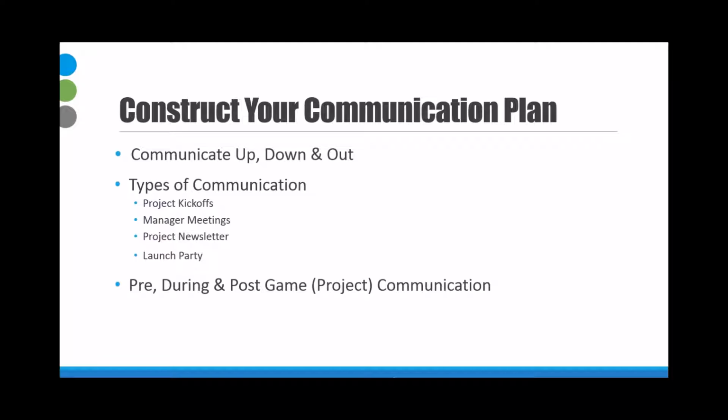One of the types of communications that I used in our project that was pretty successful was a project newsletter. Every other week I would put a newsletter together that talked about the project. Of course, we covered the project timeline, the budget, and the milestones. But really, here was an opportunity to communicate what processes were going to be changed within the system and what areas of the business were going to be impacted, and soften that by explaining it up front to people before the system was actually launched.